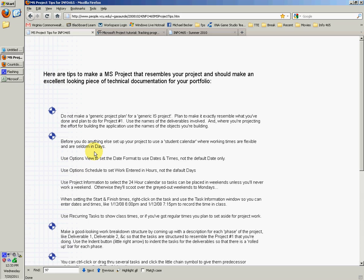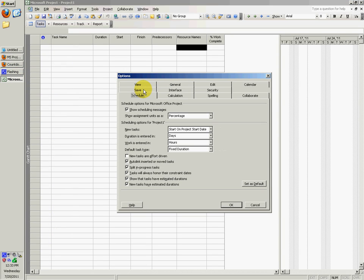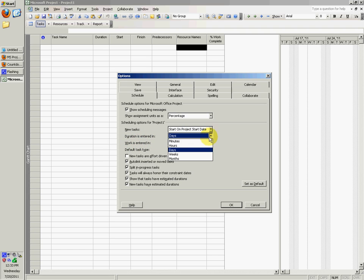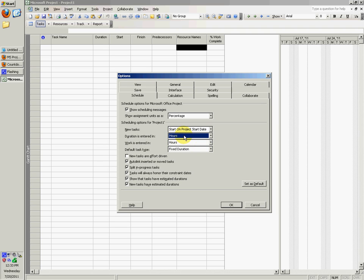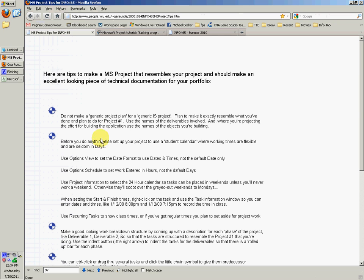Use Option Schedule to set work entered in hours, not the default days. Go to Schedule right above View and say work is entered in hours. Also say duration is entered in hours to make sure everything's in hours.